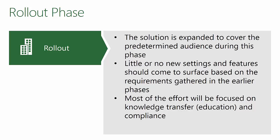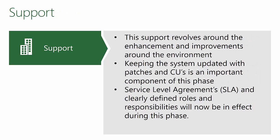At that point, we are in Rollout. We've determined what we're going to use within the tool and what configuration settings we have, and we can start training users on those settings and features. From Rollout, we then hand it over — you should be able to release some of your administrative staff, and you're now into support. Hopefully you have a service-level agreement related to how support tickets will be handled and managed. At this point, you are in production.